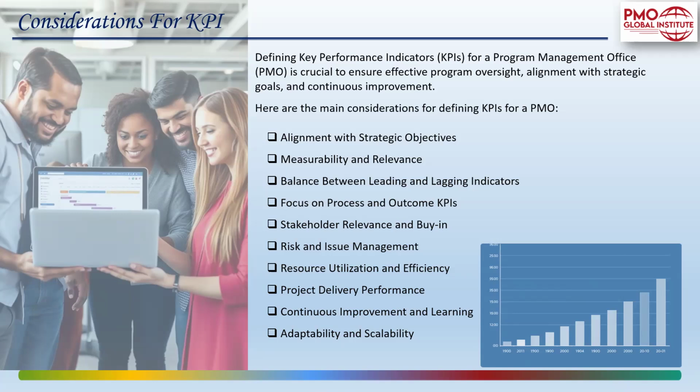They are doing a development project and define one KPI as the success rate for a software development project. Simply defining success rate will not be sufficient, because it can only be measured if we say, for example, that the defect rate should be less than 2% or less than 5%, right?